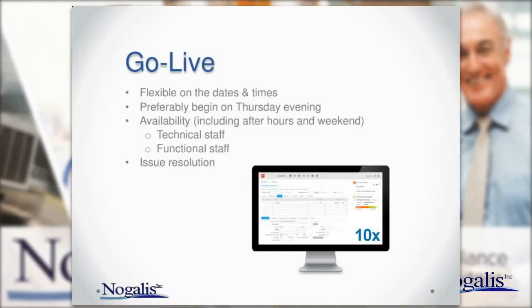We like to begin a cutover on a Thursday evening if the server is available, meaning the users essentially take Friday off so we can do the work that we do. If that's not available, Friday noon also works, and if that's not available, Friday afternoon works. But the later you get on Friday, the less chance you have of smoothly sailing through Sunday. So Thursday evening, end of business, would be a really good time to start if you can.